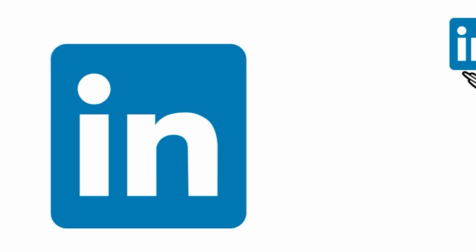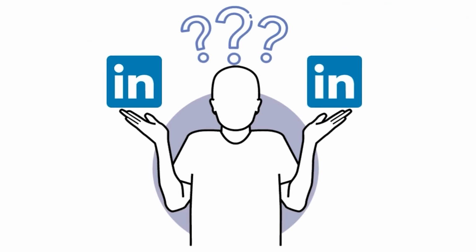I can see. So how does a project engineer get a job like this? Does the airport go on LinkedIn and search, or how did you get the job? People use LinkedIn. This project is a World Bank contract, and this form of contracts, the FIDIC they call it, is a construction project. The FIDIC Red Book defines that an engineer must be appointed over the contract. So you don't get the job, but through the process of the projects that are ongoing in the world, various employers look for engineers in that position under this contract.